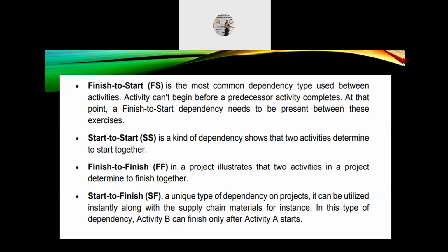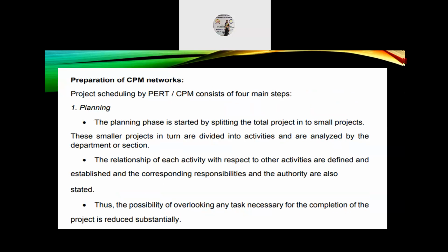Next, start to finish, S to F, is a unique type of dependency in projects. It can be utilized along with its supply chain materials. For instance, in this type of dependency, activity B can finish only after activity A starts.